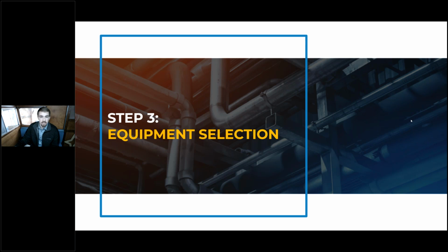But you need to ask yourself, what about this equipment makes it fit this design that other pieces of equipment might not, right? There's different refrigerants and different envelopes for this heat pump equipment. So sometimes that one manufacturer is the best option for this design, but other times you might have to go with different manufacturers based off lead times or some other factors we'll talk about.